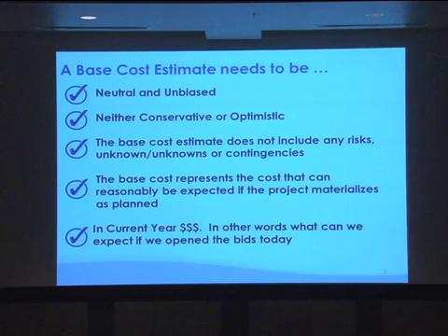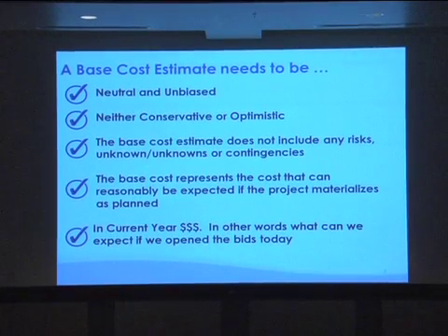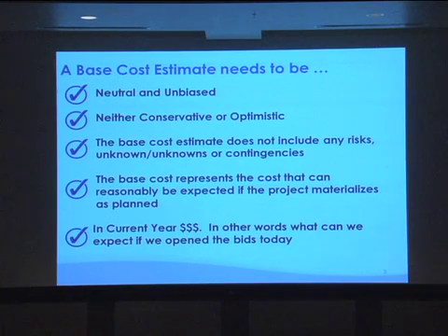So you heard earlier from Curtis that we've got a lot of different names for this thing. We've got construction costs, the engineer's estimate, the baseline estimate. I call it the base cost estimate. Basically, if there is no risk needed, no contingency needed, and I put my job out on the street tomorrow, what could I expect the bid prices to be? Okay? I don't want to be conservative. I don't want to be optimistic. I don't want to be biased or anything. I just want to be neutral about my estimate.